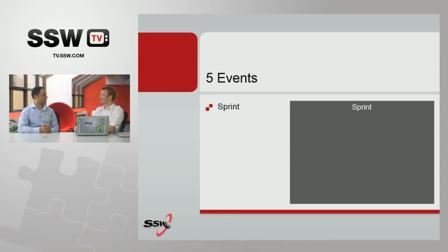Yes. Now I think the video guys wanted to do this, didn't we? And what we said to them was, decrease it to 1 week. And they were like, what? That's crazy. But if you think about it, having a 1 week cycle when you're delivering nothing allows you to focus your efforts more. So I would rather you drop down to a week and choose a lot less items and get something shippable or some product increment at the end of that week. Because the problem with it, if you go up to 3 weeks, is then you might do lots of things half done and end up with nothing shippable at the end.